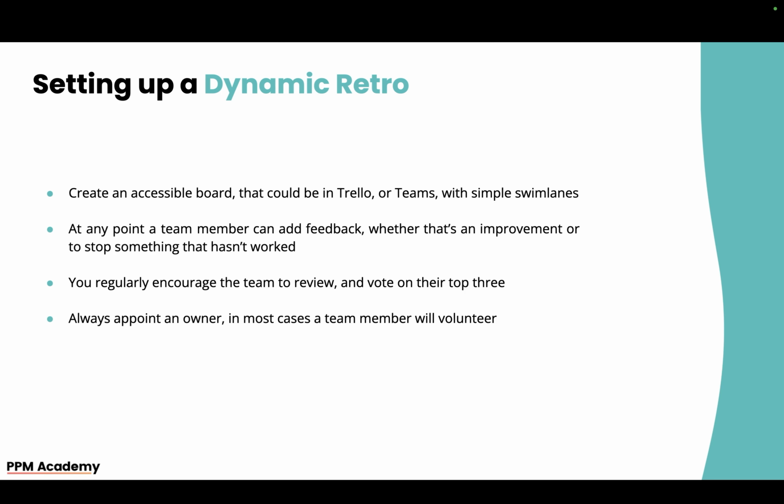And you always want to appoint an owner. In most cases, over time, once you have this running, more team members will start to volunteer. But don't fall into the trap, if you're a project manager, of just going, "I'll do it," because project managers naturally do that, but it's not always the best person to do it. So think carefully about how you get volunteers for the work.